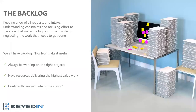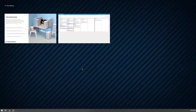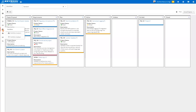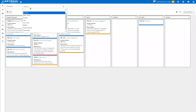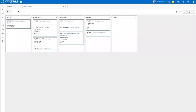The backlog — here we're talking not necessarily about features tied back to a particular project, but the fact that we've got a project backlog. We've got things we're trying to evaluate: where are we at with the different projects we have and how are we operating with them? It's about evaluating which projects we should be doing, which ones we can be doing — even if we have the money, do we have the people? In the Keyed In solution, we incorporate our portfolio analysis into the mix. We may have a backlog based off of different project requests, and we can take advantage of the same Kanban-type methodology to see where, as we bring new projects in, they may need to go down an approval path and review process before we know which workflow they'll take.